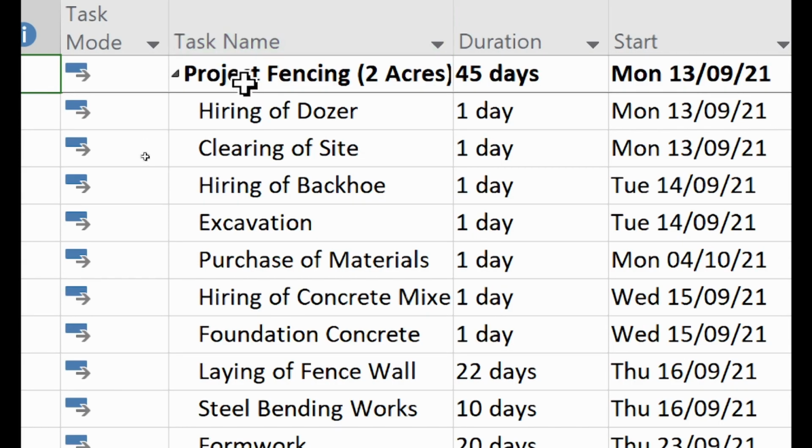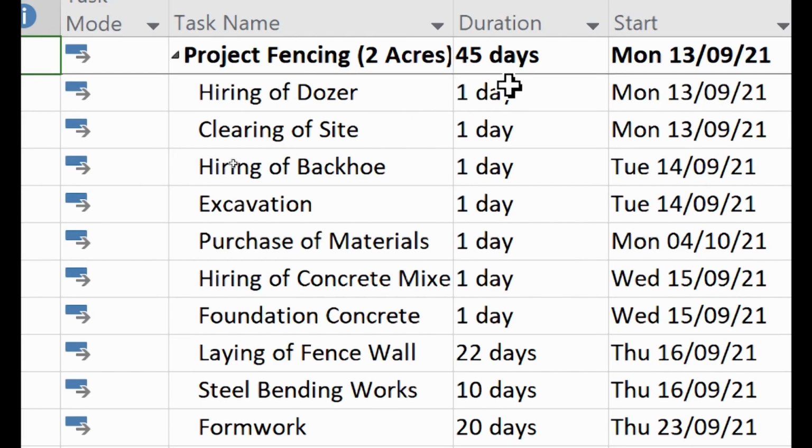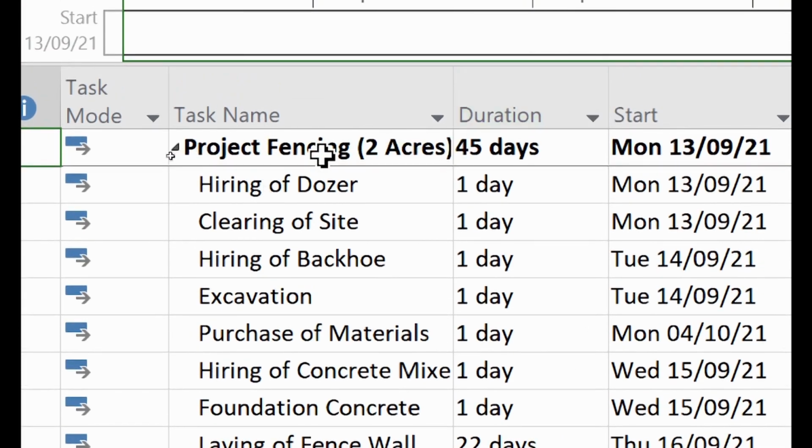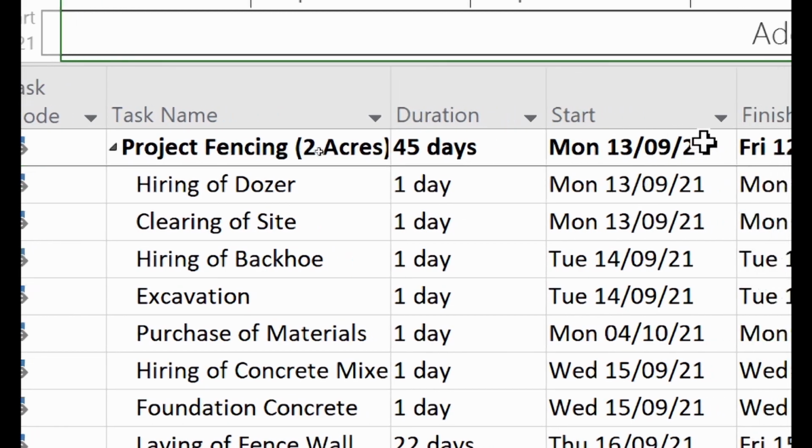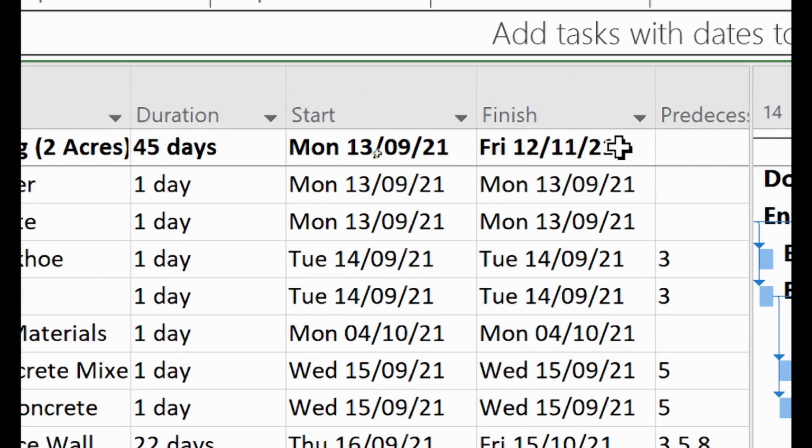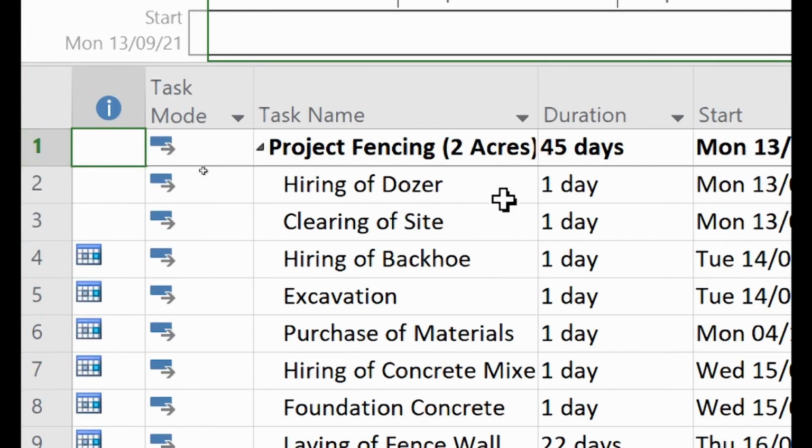This one helps because the main tasks that are listed under it will be the ones to have the main durations and the main resources and everything. But at the end of the day, it is the heading one that will give you the total duration, and it is that one that will tell you the main finish date. Please, are you following? Good. Because if you don't have that, it will be difficult to understand the project in its entire form.